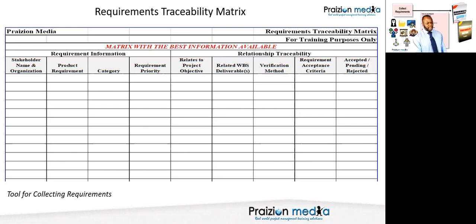When we got towards the end, every stakeholder needed to accept. They needed to say accept. So we had a shared portal, and we just had a document where everyone that had asked for anything needed to accept that requirement. In other words, they needed to test that that requirement was inherent in the software implementation. So we had a column that had test scripts.